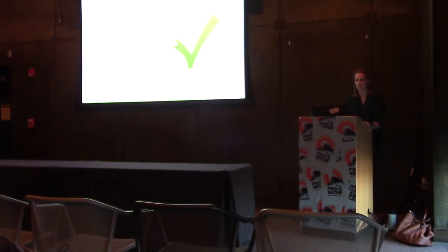And so other submittal needs. Just a few other things to keep in mind when you're submitting applications, so that you don't come up against any surprises from timelines or application fees or things like that. So understanding review timelines and whether the decision that you're asking for is going to be a staff approval versus a board approval. Staff approvals typically happen faster. If it needs to be a board approval, there might be specific review timelines that need to be followed. And so you should check with your local government unit, either on their website or contact them directly for specific information related to those timelines.